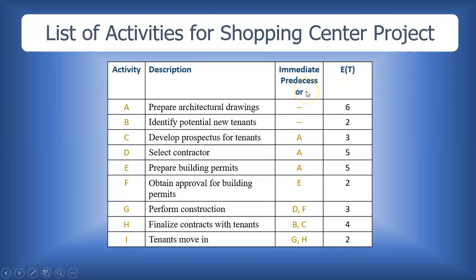In the third column we have our immediate predecessors, and immediate predecessors are activities that must be completed before we can begin an activity, or immediately before we begin an activity. You will know that activities A and B have no immediate predecessors. That means as soon as we are ready to start this project, both activities A and B can commence right at the beginning of the project.